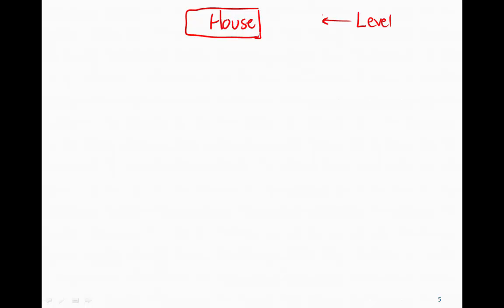So in this example, let's start off by breaking down the main deliverables of our project. Let's say in our project we are tasked with designing the concept for the house. The next deliverable that we would have is constructing the house, and then the third deliverable would be commissioning the house. So these are three main deliverables that we can list right off the bat here. So I mentioned design being the first deliverable.